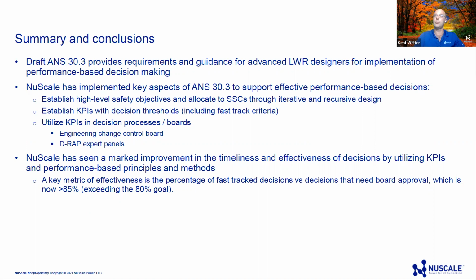And we implemented several new processes because we thought continuous improvement. We went through it a couple of times, and this new way of doing business is much more effective. The processing of ECRs is streamlined, but it's also the ability, with these change layers, to scale the impact evaluations and rapidly respond to larger potential changes, and evaluate those impacts quickly to cost, schedule, safety, and risk, and get that to a board for review and approval while the other work is continuing on. Frankly, having lived through all of it, it's a night and day difference. I very much recommend it.